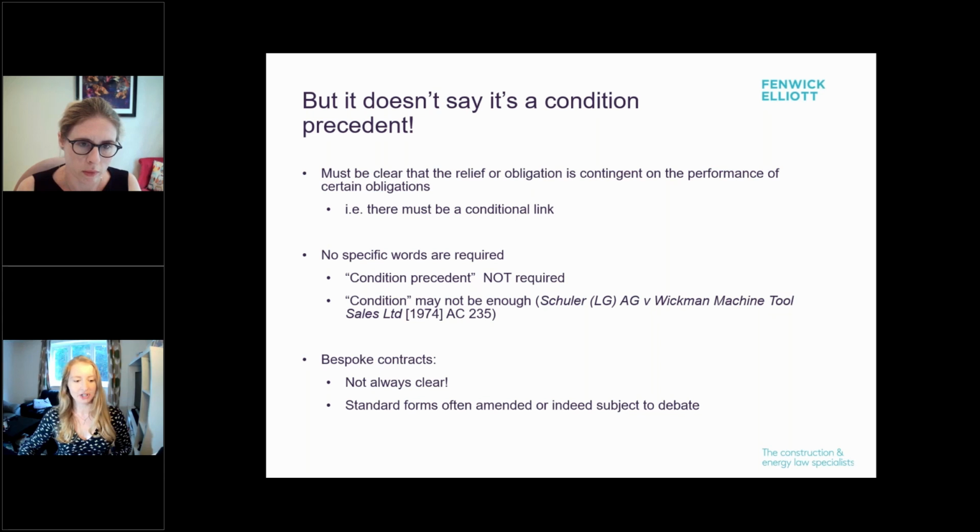So while the words condition precedent are often used, they're not required, which, while it seems generous, can lead to some confusion. If the words condition precedent are not used, it is still important to examine a potential condition precedent carefully. So a potential condition precedent that you should take note of probably will be a notice provision, but there are others. These are particularly in the case of a bespoke contract or an amendment when made to a standard form.